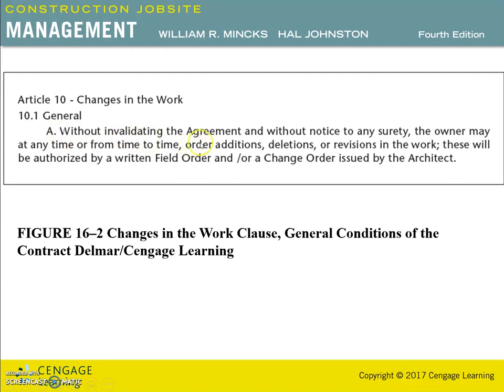Without invalidating the agreement and without notice to any surety, the owner may at any time or from time to time order additions, deletions, or revisions in the work. These will be authorized by a written field order and/or a change order issued by the architect. It should be noted that the change is authorized by written notice and not verbal communication.